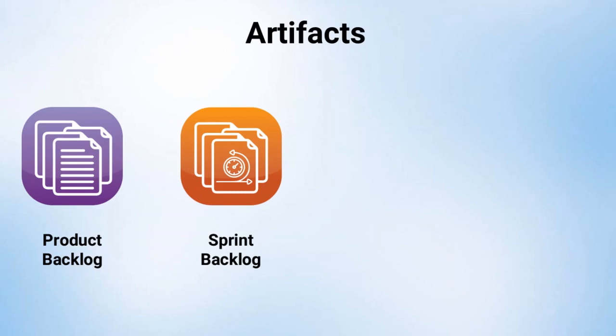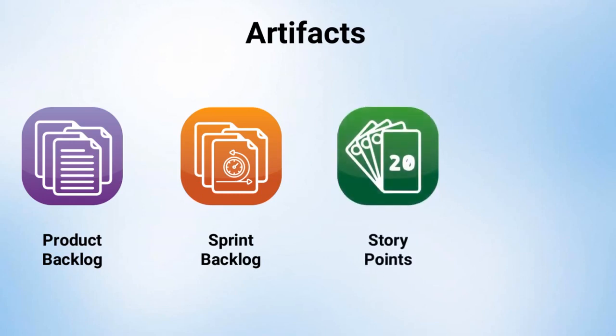As part of planning for sprint, it is common to estimate how much work an issue will take. Story points are the most common estimation statistic. Story points are a relative measure of the amount of work required to complete an issue. For example, an issue that is assigned 2 story points is assumed to take about twice as long to complete as an issue that is assigned 1 story point. Story points are used to help the team decide how many issues can be completed in a sprint.